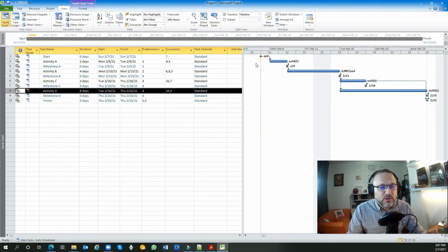You need to have a look from this line and forward. Okay, from this line, which is the start of the project, or today's line, and look forward to see which activity starts first, and you start giving this activity a priority to be executed, to be prepared.